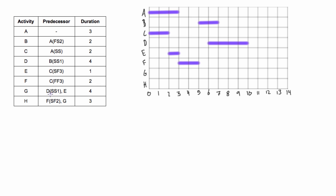Activity G depends on two things: D and E. For D, it's a start-start relationship with a lag of one. D starts on day six, so with start-start plus a lag of one, the potential starting point would be day seven. But we also have to consider that E must be done before G can start - E is finishing on day three, so that's the other potential starting place. We can't start on day three because it would violate the start-start lag of one from D. We have to satisfy both, so G starts on day seven, and with four days duration, it goes from seven out to eleven.